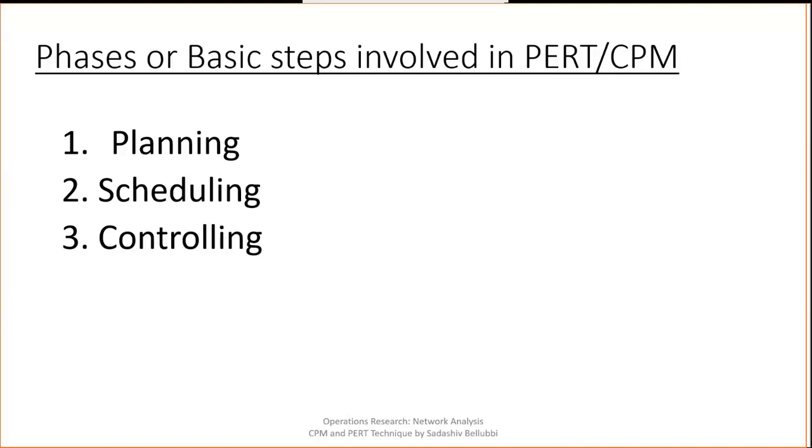In such cases, whatever the case, it should not be delayed. If it is delayed, then the whole project will be delayed by whatever time is delayed for that particular activity. The slack time and the floats for non-critical activities. So again in scheduling, we need to concentrate on the slack time and the float for the non-critical activities.